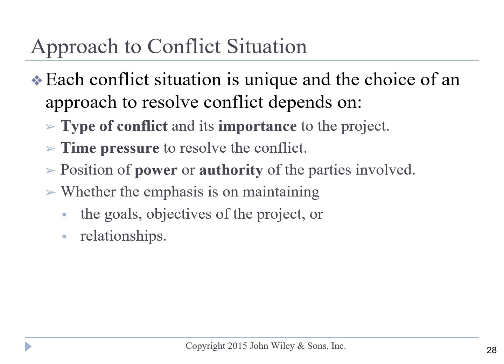When conflicts arise in projects, we have to decide how to deal with it and how to resolve it. But the way we go about doing that depends on the type of the conflict that we are facing, and how important this conflict is, and the time pressure that we have to resolve this. Do we have time for lengthy negotiations, or do we need to solve this quickly? Also, the position of power of the two sides of the conflict. Does one have a lot more power over the other person, or are they peers?